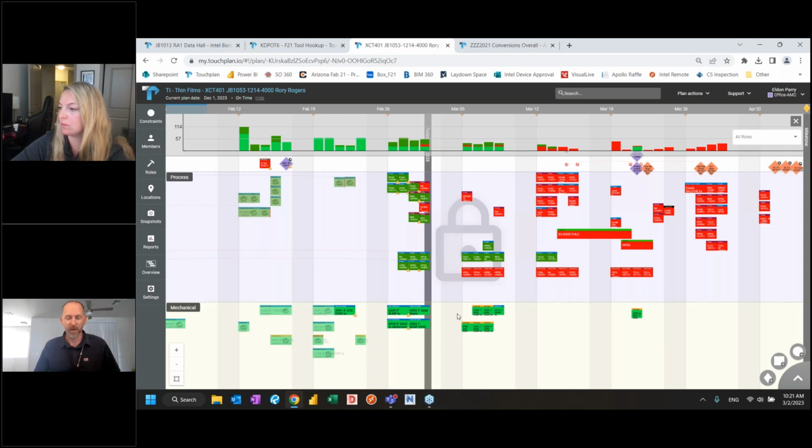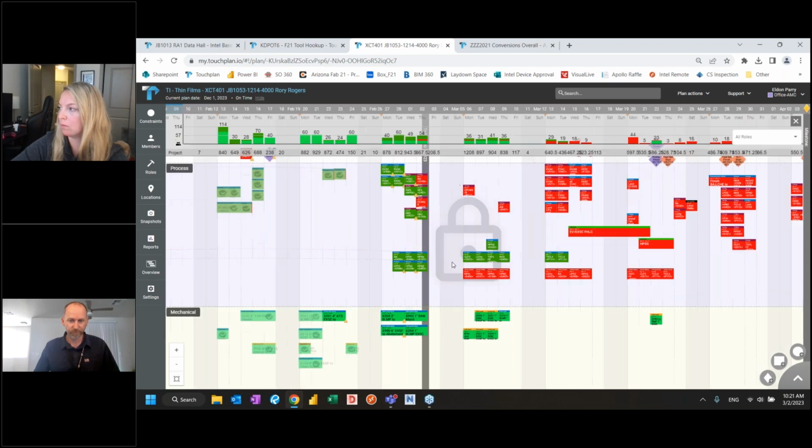to apply manpower. There's no yellow tickets on this one, but yellow tickets would indicate that if we got desperate and instead of laying off folks, there are yellow activities we could put them on, although it wouldn't be the most efficient use of time.